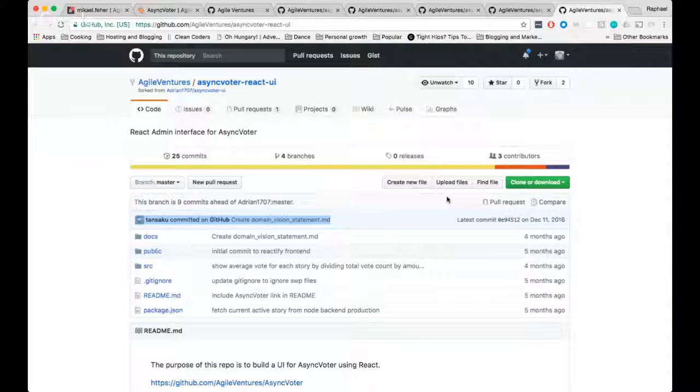one agile technique for estimating the time it takes to build a feature is called Planning Poker. Everybody takes a vote and looks at it, and you look at the outliers, and then you question those people who have submitted an outlier and say, hey, Jack, most other people have said that they think this is going to take 2 days.